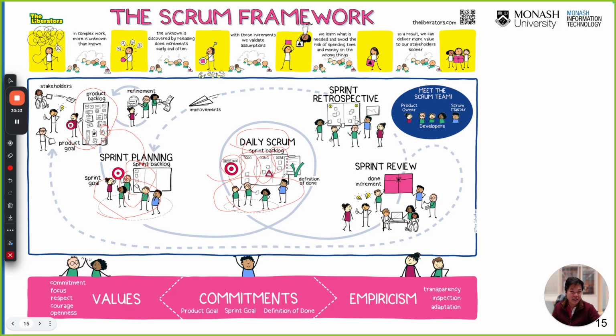For each of the done items, does it have any definition of done? To make sure that whatever you actually deliver or complete is aligned with the definitions of done. Do you remember? Okay. So every day you finish the daily scrum, finish the task, whatsoever. And at the end, you can conduct a sprint review. Okay. In the sprint review, you want to check if everything is ready to deliver to the customer. Okay. Once you deliver to the customer and all is done, okay, then everyone conducts a sprint retro to